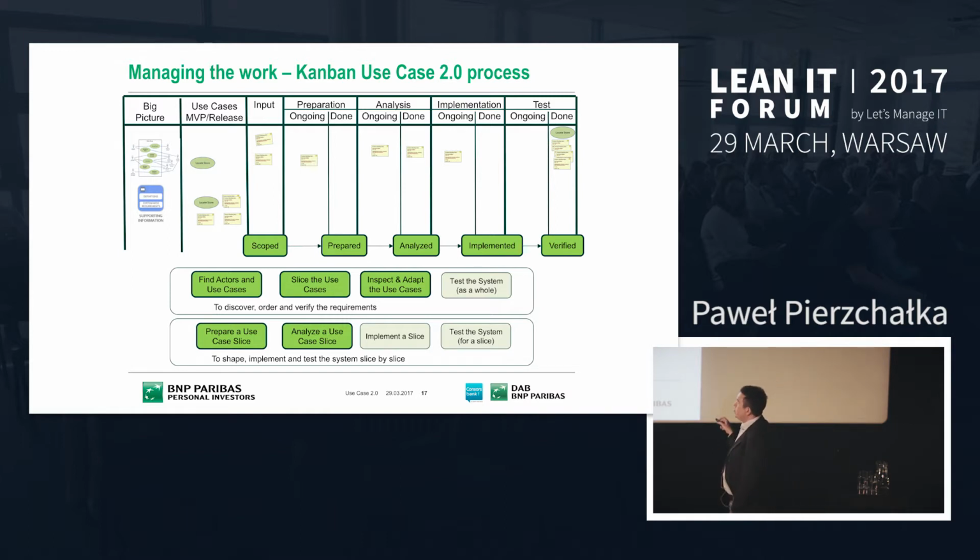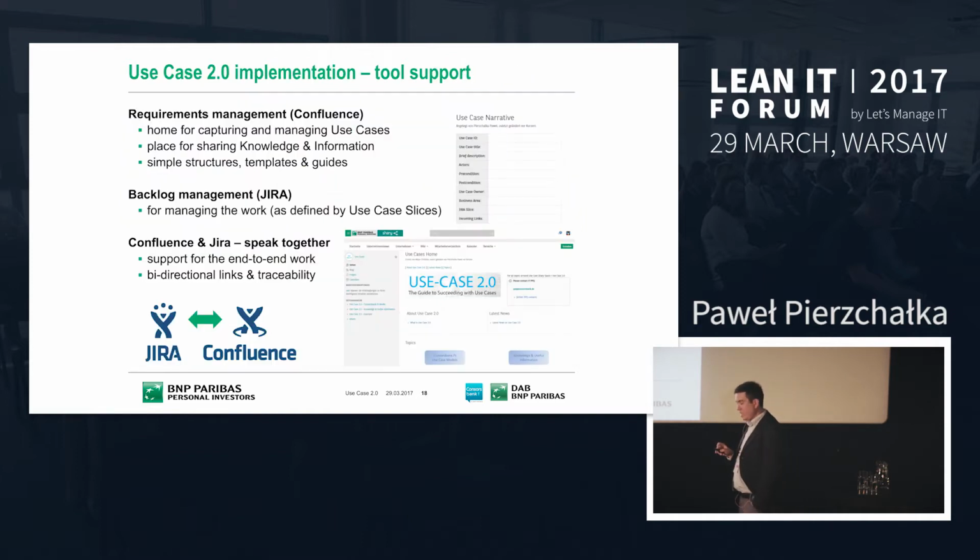And we believe it helps us to make the development parallel, because in the analysis, the solution architect and solution designer can concentrate on identifying the impact on the current components, or the new components or business flows we have to develop. At the same time, the business person can concentrate on refining the second use case, for example. So it flows, and it makes the work more parallel.